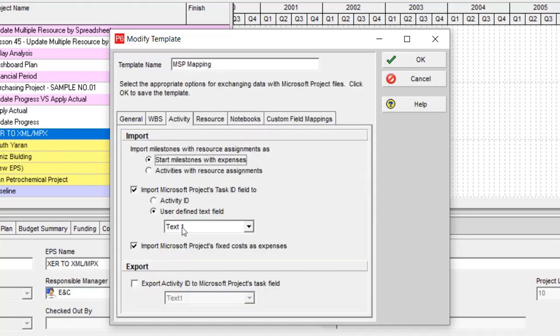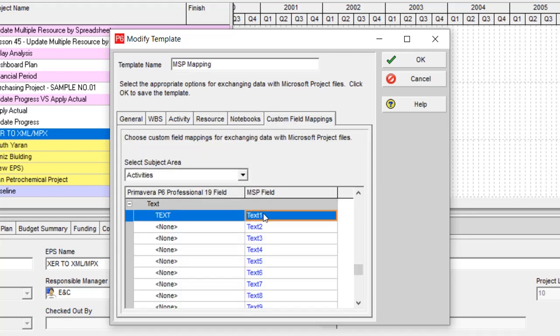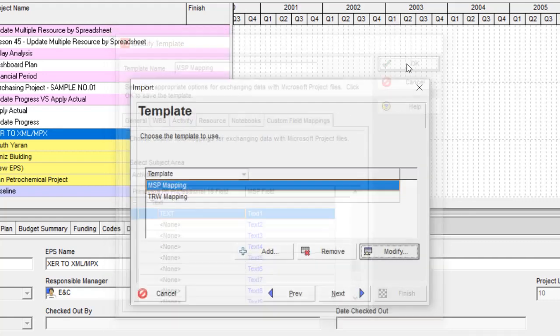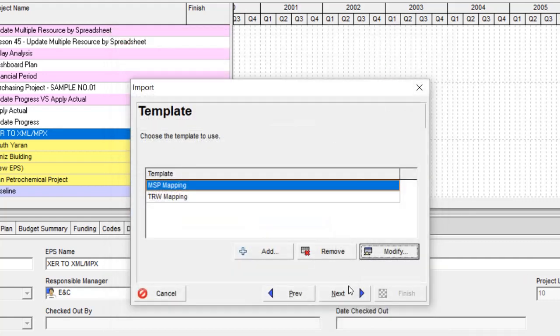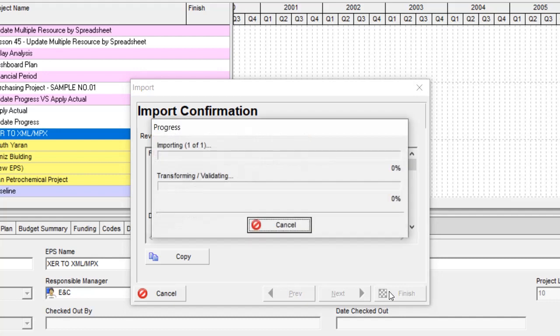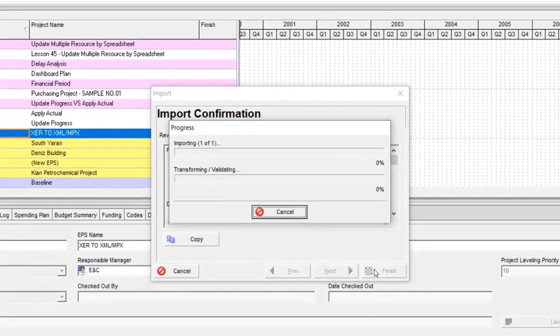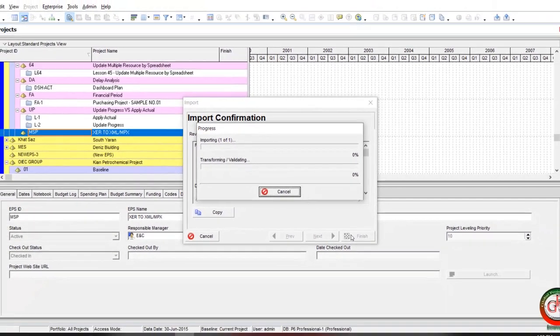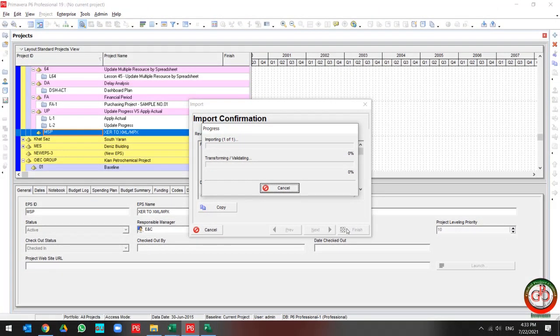So I want Primavera P6 to accept it to the text user defined field. For mapping activity ID, these two software do not accept directly activity ID from each other. So it is a good solution for you if you insert the activity ID to the Microsoft Project by copy and paste, then insert it to the Primavera P6. Let's see it to be inserted. Then after that, by using the global change, you can instantly update your activity ID fields. I will show you in a few minutes.